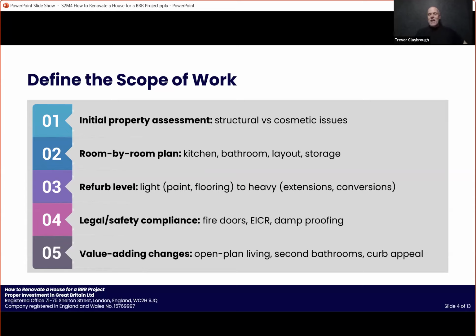And we're basically going through every room. We're looking at the electrical fittings. So we might see there's only one socket that looks really old, so we need to do some electrical work. We're looking at the woodwork, the carpentry. Are we going to replace the doors? Are we going to redo the skirting board? We're basically looking at absolutely everything that's in the room and making a list, saying this is good, we're going to keep it, this we need to change.